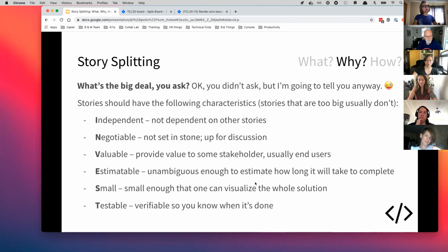Cool. Yeah, and just to piggyback on that, it's a way for teams to have a predictable cadence. Our team is this many developers. We have these stories that take 3 days to complete. So if a sprint is 1 week or 2 weeks, we know approximately how many stories we can get done in a week. And then we can look at that control chart and ask, how are we doing? Was there something that got in our way? And then in our retrospective, we can say, what happened? And as a developer, it really helps you feel more in control rather than having this huge chunk of work that you have to break down in your mind. This work is broken down for you.